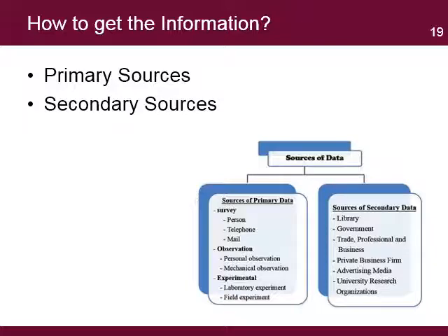The project will evaluate the best and most cost-effective method to getting the information. There are two common methods to get information, from primary sources and secondary sources. Collection from primary sources means that the project team, by the means of surveys and other tools, collects information directly from the source, in this case, beneficiaries. But it's more time-consuming and expensive due to the logistics, but assures the project gets information with the quality needed.